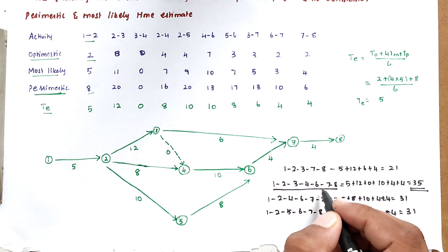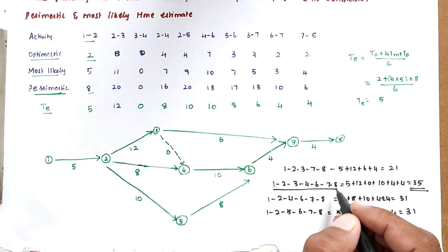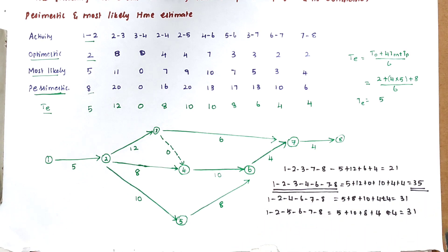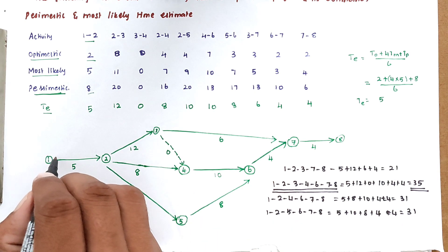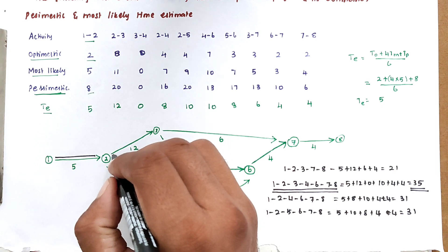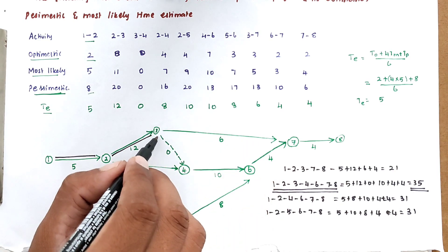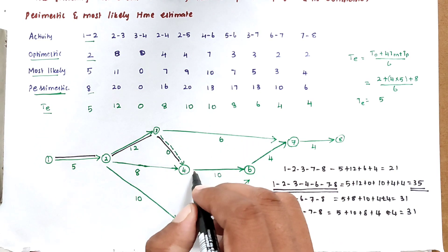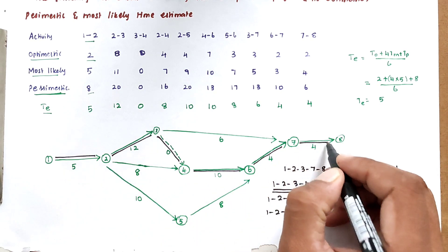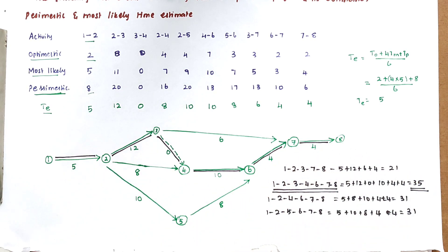The highest duration is 35, corresponding to path 1-2-3-4-6-7-8. This is the critical path and the critical (project) duration. We mark this with a double line on the network diagram: 1→2→3→4→6→7→8. This is how we solve a PERT problem. We will see the next video — thank you.